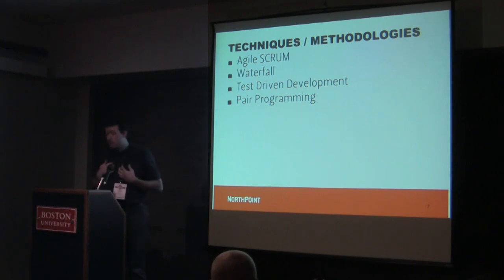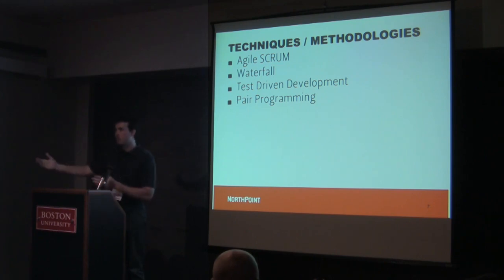We tend to mix the first two. Everyone is trying to push for, we want to do all agile development, all agile and Scrum. But what we find as a consulting company, we can't really do that. We have to come up with a proposal, which means our client has to come up with a lot of the requirements up front. So we have to mix waterfall and agile.